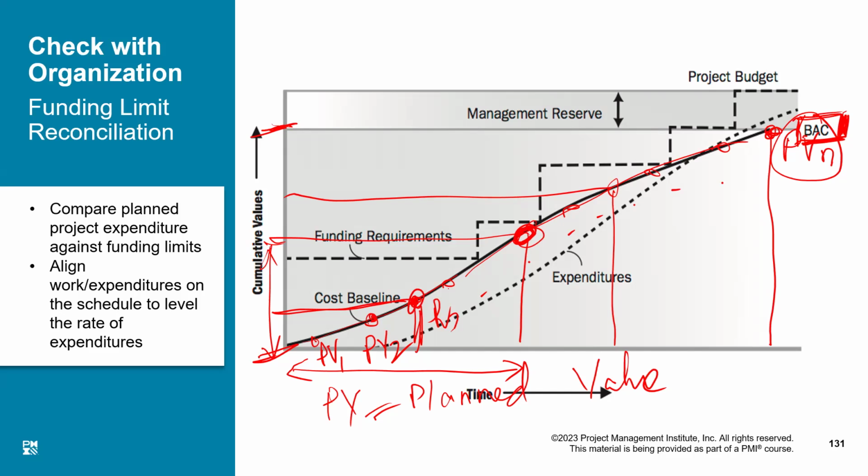Yes. As far as contingency reserves are concerned, they are built into the activities and work packages. Therefore, you can't see them separately. But on top of the budget at completion, management keeps their own reserve, which could be anything the management has agreed, could be 10%, 5%, 20%, depending on the nature of the project and how much reserve the management wants to keep.